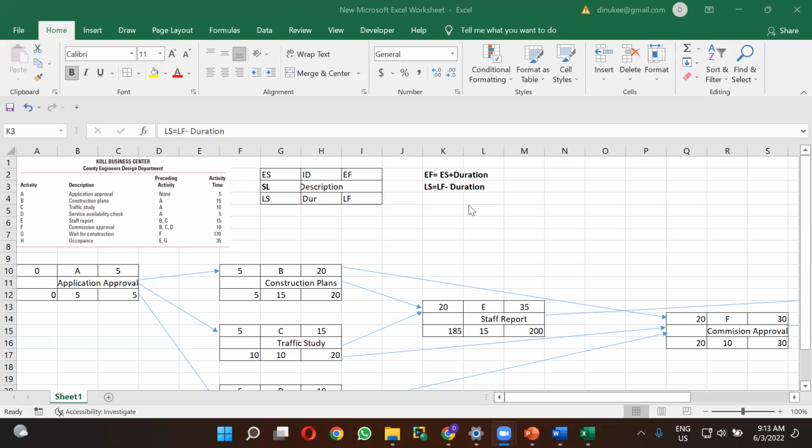Whether it is lowest or highest. Right. Very good. So when you are doing the forward pass calculation, if there are two or more arrows coming for the node, you have to choose the highest value. So please make some note of those things, otherwise you may forget them, right?